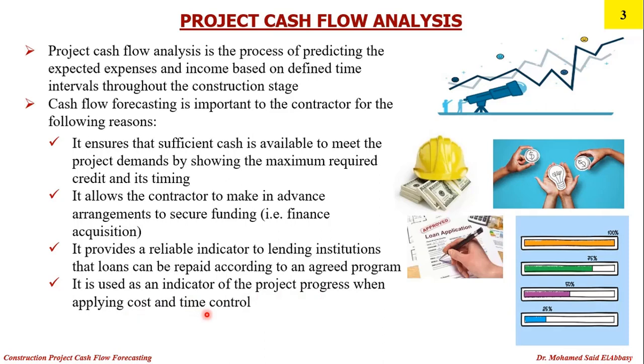I have mentioned that before, when we apply earned value management. With earned value management, simply we need to know, are we ahead or behind schedule? How do we do that? We have to refer to our cost baseline, the S-curve that we have seen at the beginning of the introduction of this lecture. So basically, it's not only time, it's also cost. There is a cost overrun or there is a cost underrun. So again, this cash flow will help me to identify these project progress parameters or performance indicators.